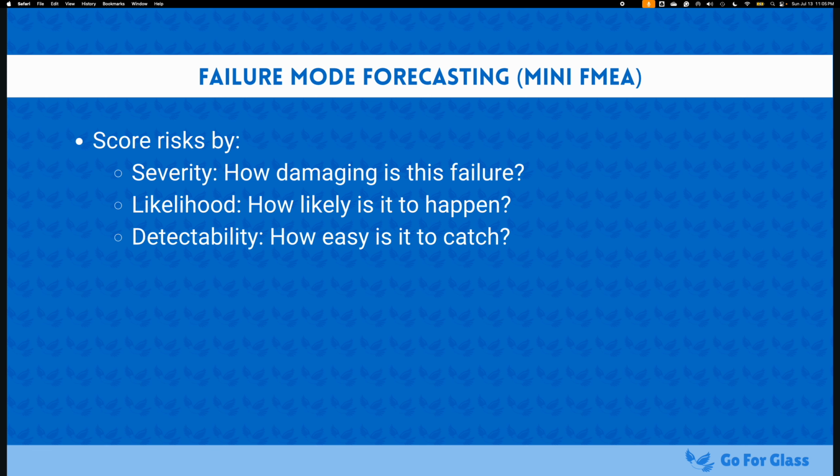On a scale from 1 to 5, where 5 is the least risky and 1 is the riskiest, that'd be a 5, because that means we actually have extra budget to play around with because we overestimated how much gas would be. However, if we underestimated wildly how much gas would cost, you could rank that closer to like a 1 through a 3, depending on how underestimated it is. If for some reason it's $300 over what you estimated, that would be like a 1.